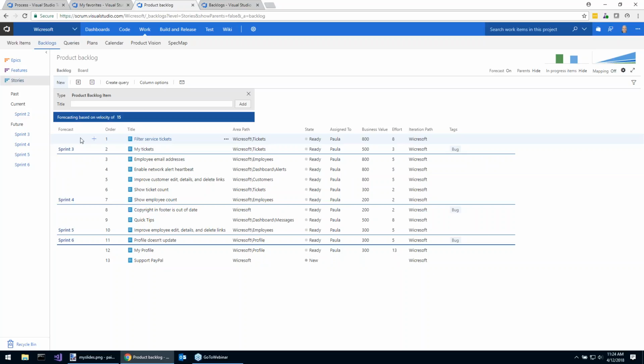I can say, well, given our current velocity and our current plan, sprint 6, but you can give them a number based on empirical historical data. And that's powerful. That's probably the lie that's going to be least wrong. I can say all kinds of lies when people ask me when something's going to be done or what it's going to cost. This one at least is backed by empirical data that the people doing the work have given you.